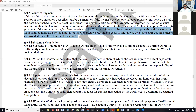Substantial completion is when retainage begins to get released, when the owner can actually occupy the space, and when the one-year warranty period for finishing any punch list items begins. As the architect, we're really not hanging around that property much longer after substantial completion — our duties essentially run through substantial completion and then final completion, where we do the final walkthrough. But substantial completion is the big milestone.